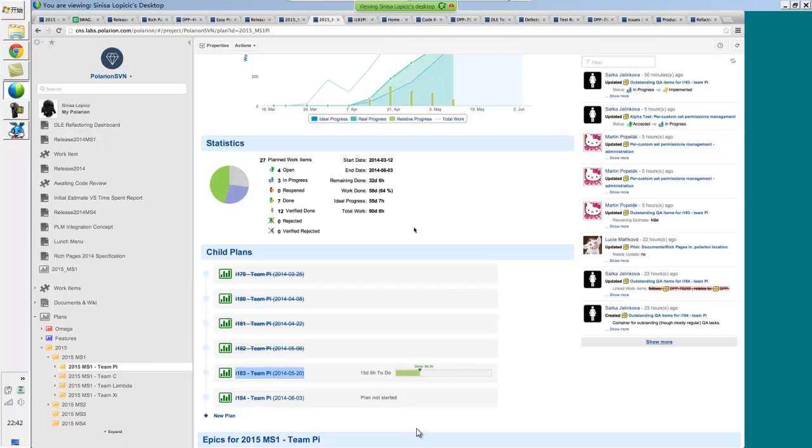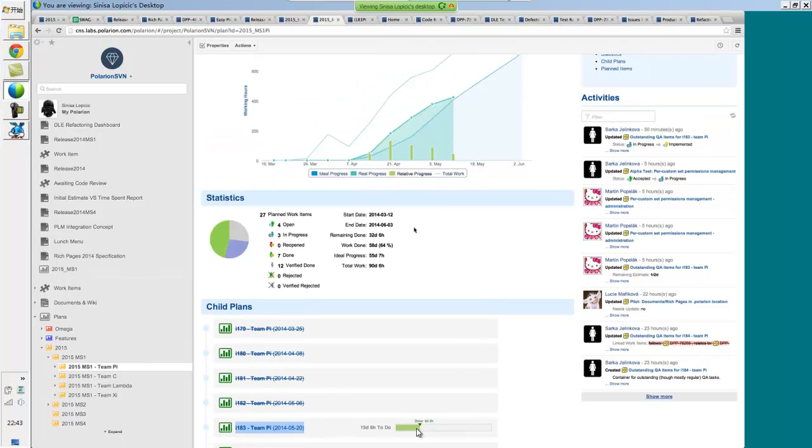The most obvious one, on the right here, is the burn down chart. This basically tells us graphically how we're progressing. As you can see, the weekends are included here and also statutory holidays. In Czech Republic, last Thursday was a day off, and this is why it points to a flat line. As you would expect, nobody would work, therefore there would be nothing burned.